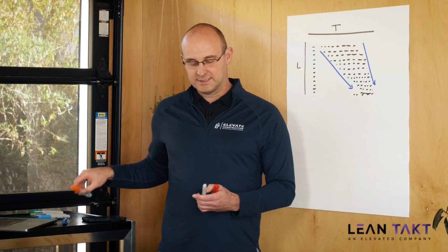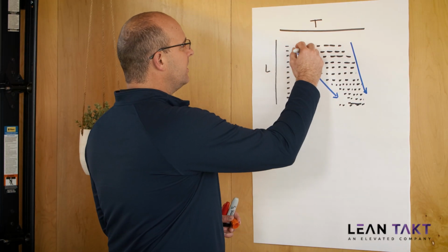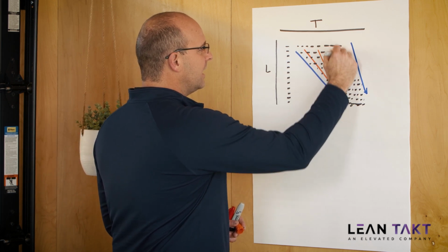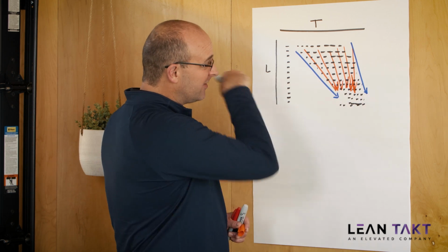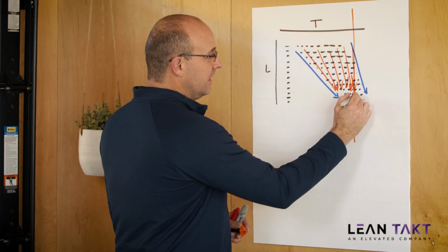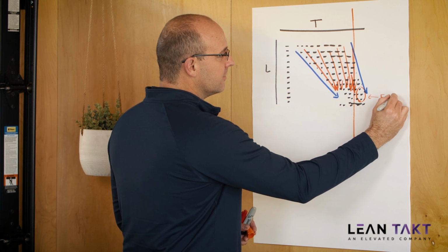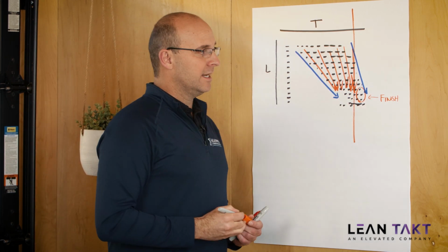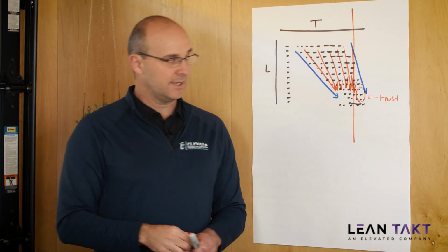What we realized here, and I'll mark this with orange, is that they had pretty good trade flow, and then they started to stack literally to where the trades were on top of each other vertically. And these items at the end were just the finish items for the project. So they were literally, with their schedule logic, expecting the trades to be in like 8, 9, 10 areas all at once, okay?